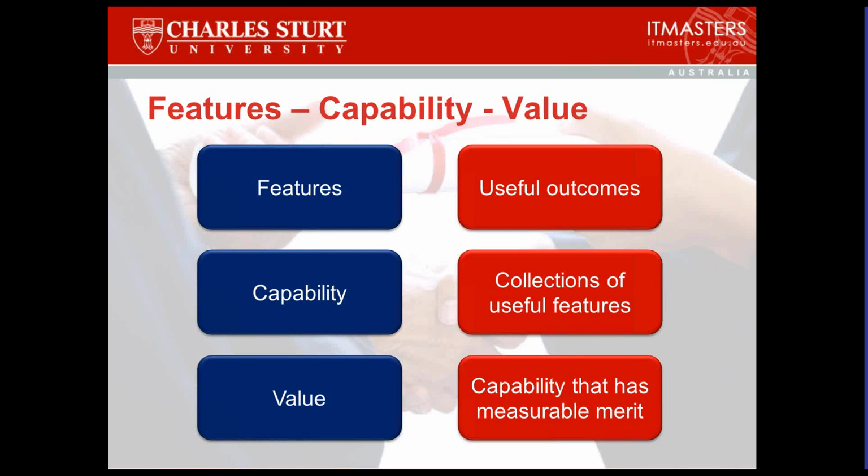Yes, there is such a thing. And most Scrum practitioners will typically tell you that anywhere from half a dozen to a dozen is considered a good number. Now, there are obviously going to be some relevant factors based on the work they do, their industry, how familiar they are with working together, and a few things like that. So there are always going to be factors. There's no hard and fast rule, but anything less than half a dozen, and they become too small to be collaborative. Remember that your team needs to be able to share information. You want to have a collaborative review process.